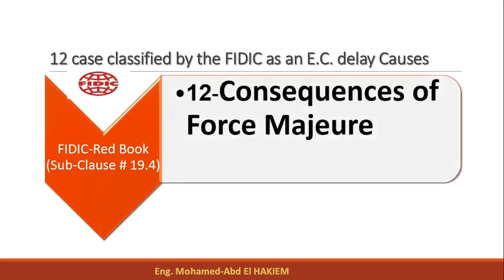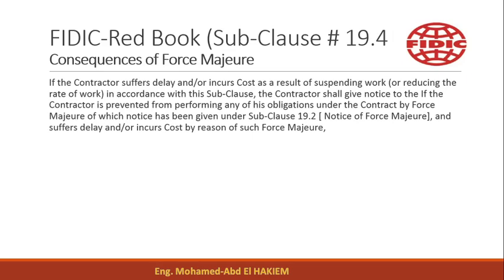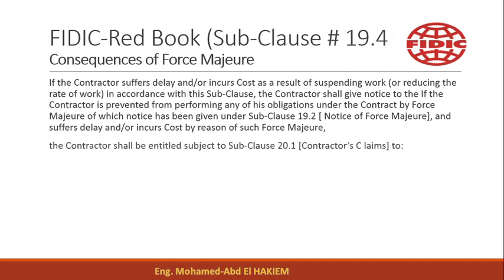Cause 12 – Consequences of Force Majeure. If the contractor is prevented from performing any of his obligations under the contract by force majeure, of which notice has been given under subclause 19.2 – Notice of Force Majeure – and suffers delay and/or incurs cost by reason of such force majeure, the contractor shall be entitled subject to subclause 20.1 (Contractors' Claims).